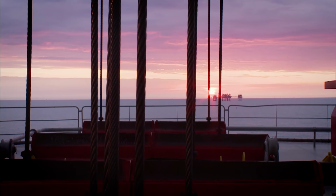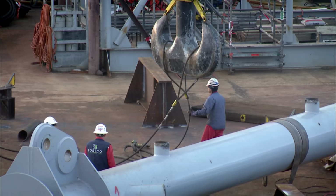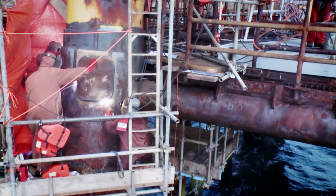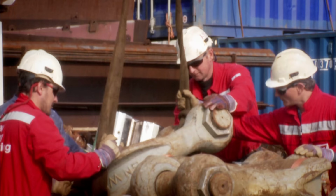Lima was at the heart of the Indefatigable gas field, which was discovered in the 1960s, 70 miles off the Norfolk coast. Now the gas has run out and it's being decommissioned. The whole project will cost £1.5 billion and involve the expertise of more than 1,000 engineers. Removing every last trace of Lima will take 9 months.